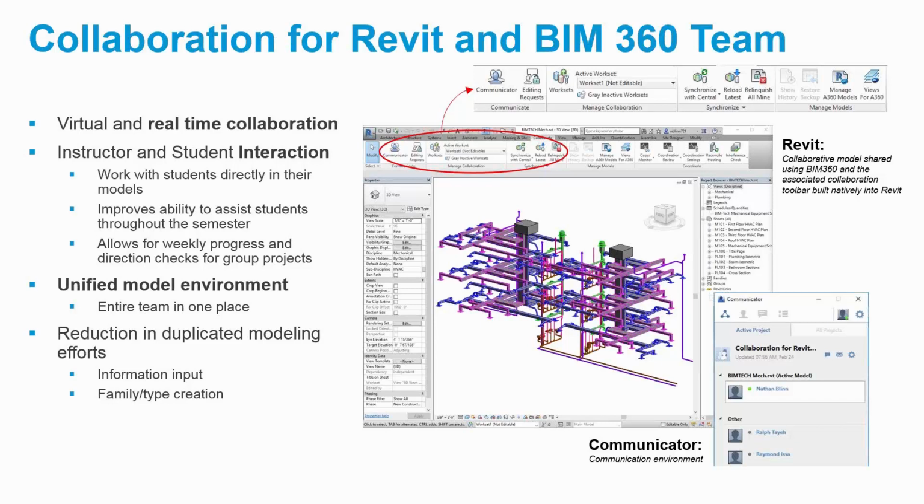And so by doing it in this environment, now everyone has access to those. So we're reducing the duplication of effort, and we're reducing the potential for someone to overwrite things, because this has kind of built into it a check-in, check-out process where once you start using an element, it's checked out to you, and the only way someone can get it is to send you a note asking you to release it back. So you kind of eliminate that potential error, which we have seen quite frequently in the past when they use other cloud sharing platforms.